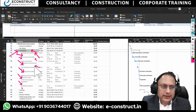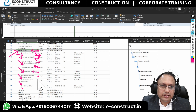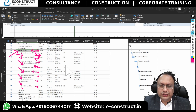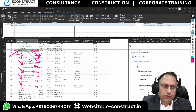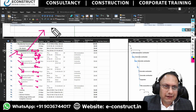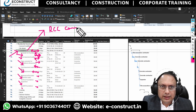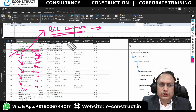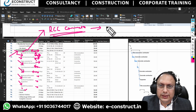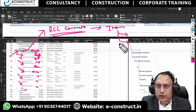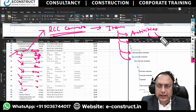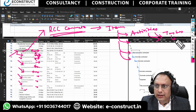A sub-task is a kind of activity that you want to do, and these are the different tasks you are going to do. Every activity will have a certain duration, and each task will also have a certain duration. So you have to get into the tasks and sub-tasks to understand how it works. Many times the task work will be defined from the tender — for example, RCC concreting is one item, which includes foundation, framing, upper floor, and so on. That item has to be divided into different activities, and those activities also need to be divided into tasks and sub-tasks.